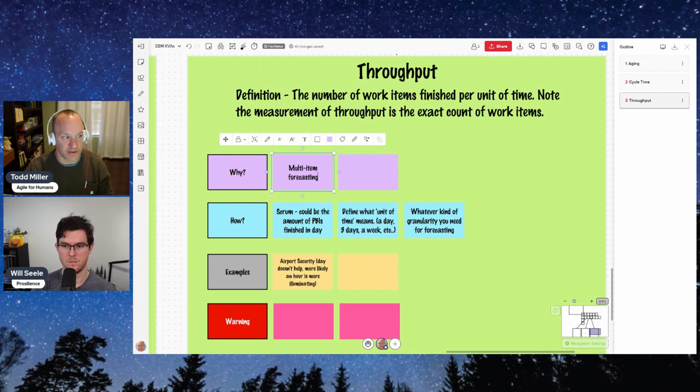So if you have a list of things to do and someone comes to you and says, when is this going to be done? You can give them an answer with a probability, right? So you could say, okay, we have 72 things on the product backlog, or our options pool. And according to what we know now, 85% of the time we'll have those 72 things done in 112 days, right? But keep coming back, and we'll keep talking to you about it, because it's like the weather. We continue to update it. We continue to arrive at it as we get new and better information.